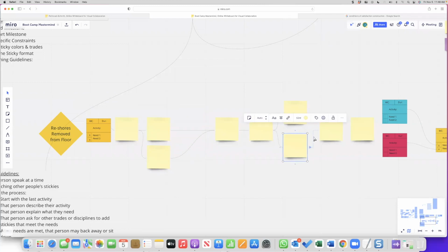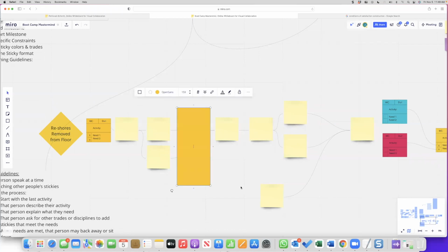This one is actually, we listed it as a part of the sequence. But actually that one doesn't have to be. That's really just kind of a backlog item. So that could be put down into our workable backlog. It does need to be done before the actual end. So I'll put a tie right there, and now you have a complete sequence. What we've shown here in the middle was an optimization, meaning because we could see that there was a way to do concurrent work, we've optimized that and we can go a little bit faster.